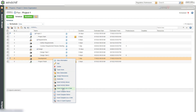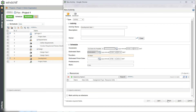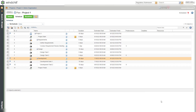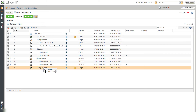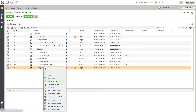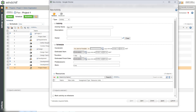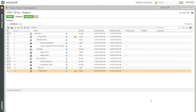Again, we will create child activities for the development phase. Let's create the activity to sign off the project. We want this activity to start as late as possible. Create the activity, select the As Late As Possible option, provide the duration and then click Finish. The activity will be scheduled for the last day of the project with the duration of one day.